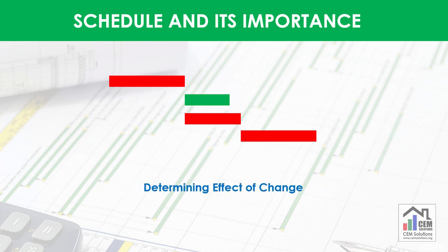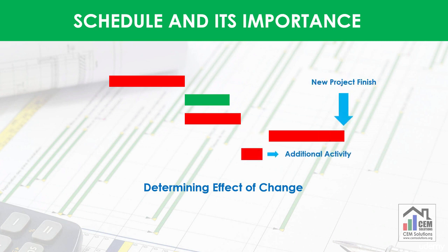Schedule also helps in determining the effect of a change on a project. For example, if the client wants to add some additional feature in a project, then a new completion date can be predicted by adding activities in the schedule. This prediction can help the client to finalize his decision and will also help the contractor to claim extra time or cost for this change.